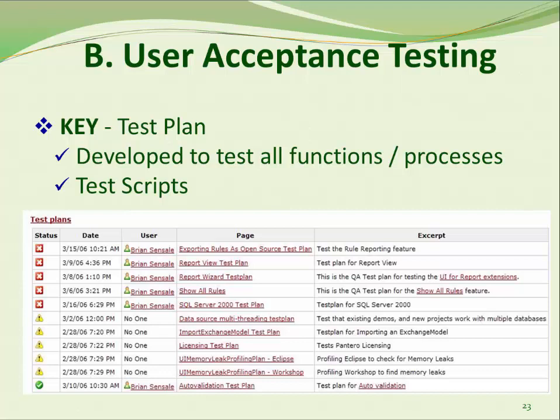There are two key elements that can make or break UAT. The first is the test plan. The state should develop a formal test plan for UAT that includes real-life scenarios. This is where the interaction between the development testers and a specific group of end users is important. The test plan should detail all steps of the testing process and include all functions to be tested, inputs, and desired results. Users should test the system using scripts that document the path to an error, so it can be replicated in order to be corrected and the fixes can be validated in UAT.